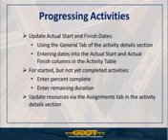Yeah, and when we talk percent complete in Primavera terms, there are a number of different ways that Primavera allows you to calculate percent complete. One of which is as it relates to duration, a duration percent complete. How much of your duration have you used, and that generates a percent complete. You can also base it off of your resource units. How much have your resources worked in terms of calculating the percent complete?